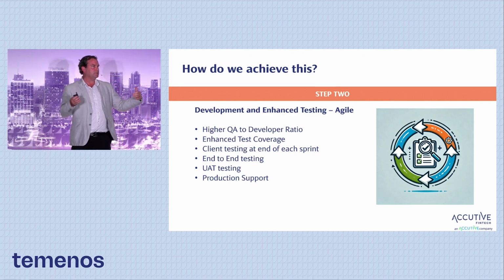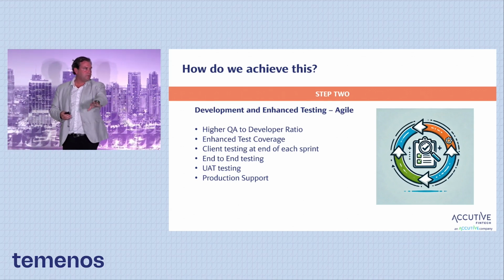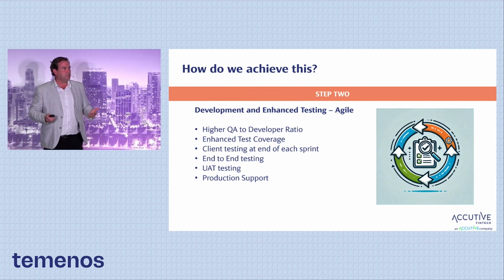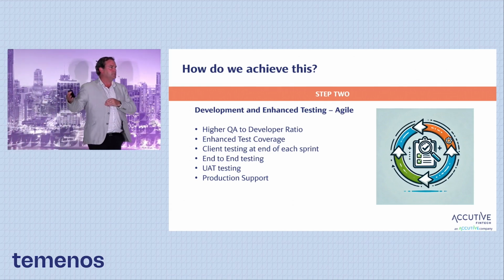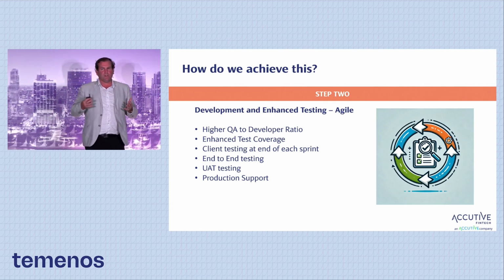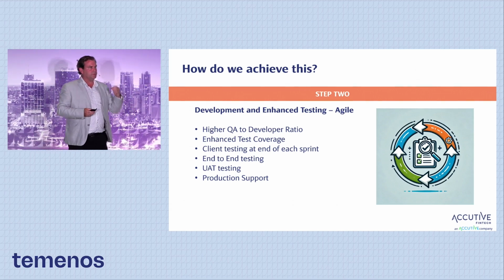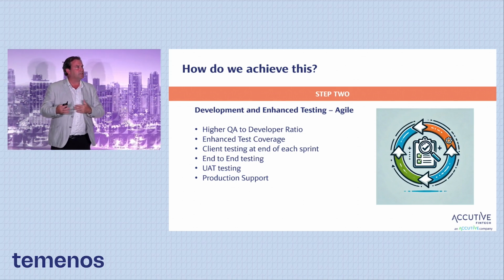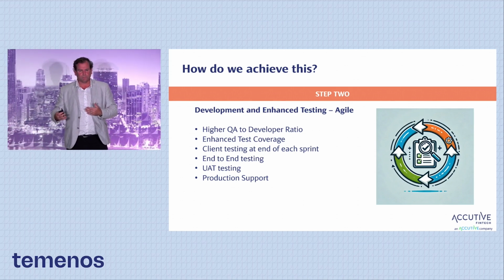All right? So if you're at 20% or higher, we can get down there just by following some of these techniques. We always suggest doing UAT testing. So that's your end users, your business users coming in and testing it. That's the final test to make sure that the business and technical requirements you've built out, the end users aren't saying, this isn't fit, this isn't quite working for us.